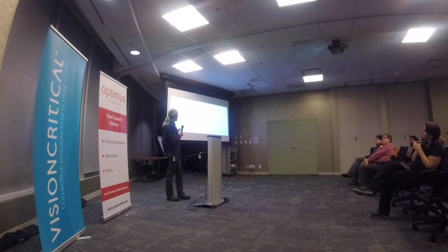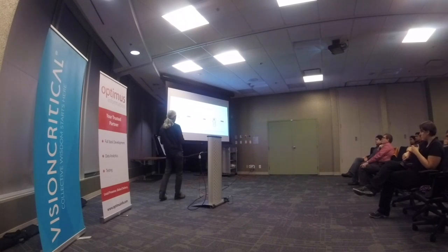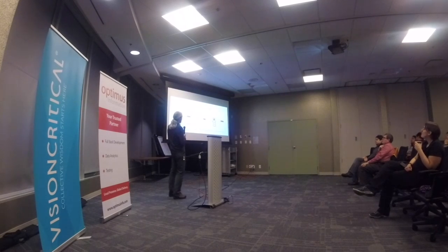You're trying to do that to come up with what am I most concerned about? Where do I think that the biggest risks are? And if we assume in this diagram that for the new feature that we're producing, we're actually touching each one of these boxes, then we've got effectively risk across the entire thing. We've got to find out now what levels of risk do I have. So if I do that roughly, I'm saying that the red indicates a high risk and the slightly orangey color isn't projecting very well. These are medium risk and then the low risk is, and I'm arbitrarily doing that just to share with you some idea of how you might do this on a whiteboard or anything else.